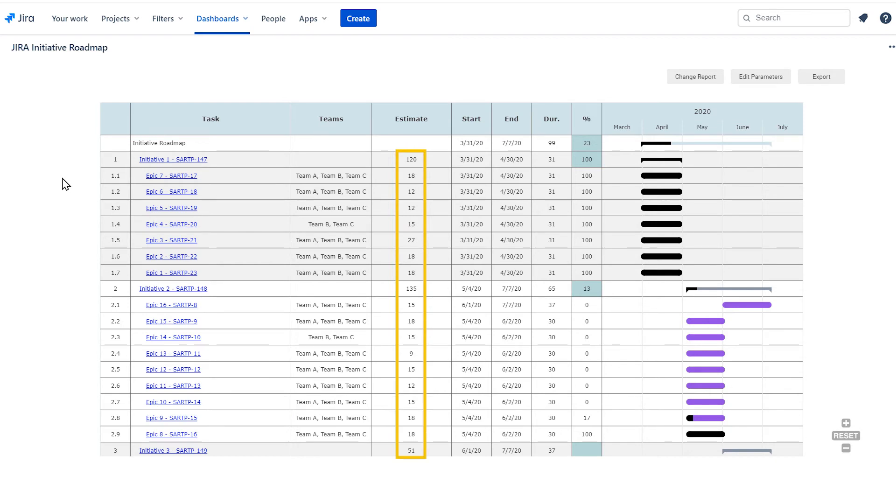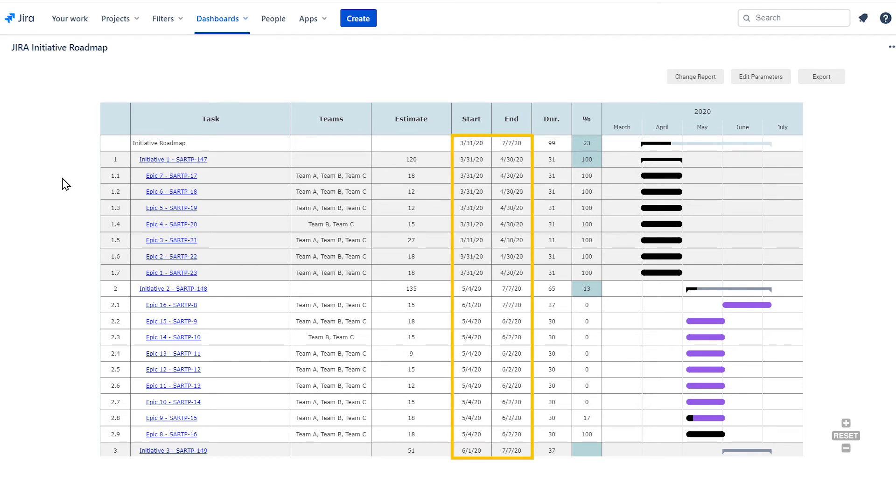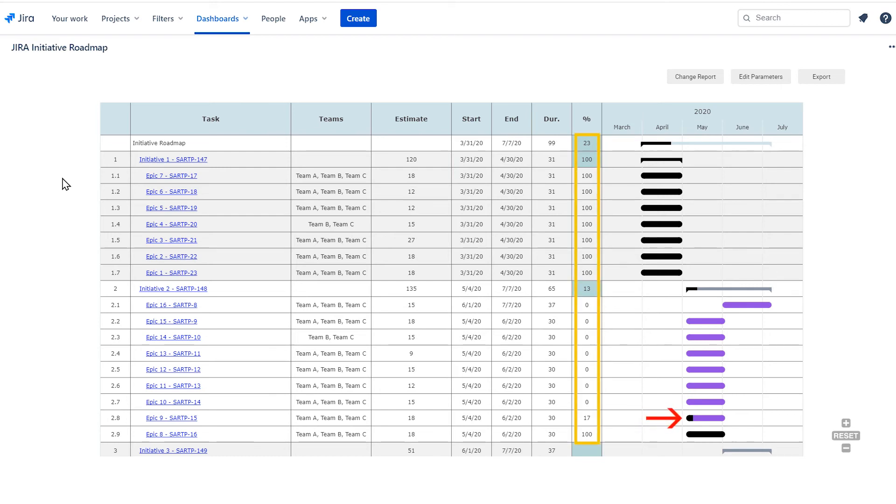Estimates show you the story points rolled up for each epic and rolled up to the initiative. Start and end dates are based on the fixed versions selected in the parameters. The percentage completed is shown numerically as well as visually using a bar for each epic and initiative.